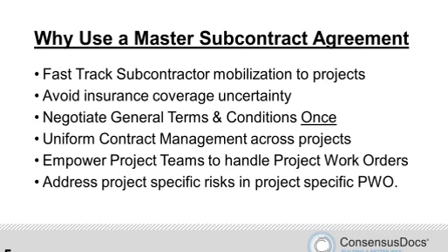As most of the construction folks out there will know, one problem after notifying a subcontractor that they've been awarded the project and then sending them a copy of the 37, 40, however many page subcontract agreement that you have with them, is you never know what the turnaround time on that is going to be. And then when you get it back and you need to bring it to legal counsel or seek advice from your legal professionals, that just takes time.